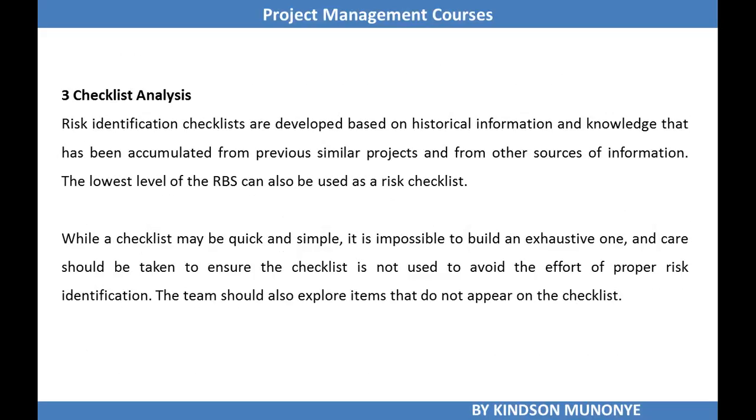Another tool and technique used in the identify risks process is the checklist analysis. Good. Take note that a checklist is a structured list, and risk identification checklists are developed based on historical information and knowledge that has been accumulated from previous similar projects and from other sources of information.